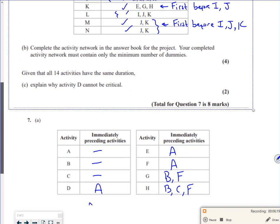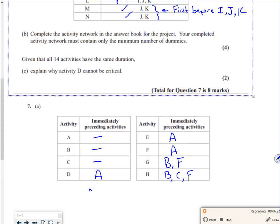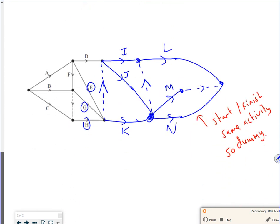Let's have a look at this last bit here. So it says, given that all 14 activities have the same duration, explain why D can't be critical. So let's have a look. So what I tend to do is just, in my mind, work out how I can get there. So I kind of set all the activities to have a duration of one. So this is for C. So if you imagine that all activities have a duration of one. Now B and F, where's B and F? There. G can't start until B and F are finished. And F depends on A. So the earliest G can start would be at 2.